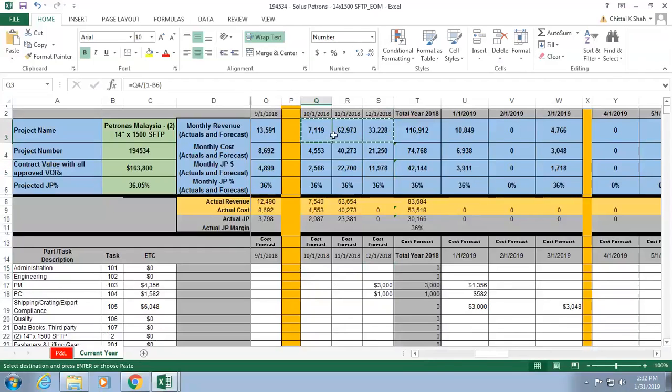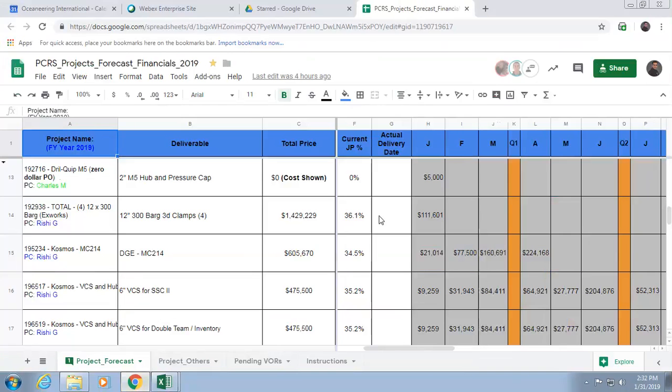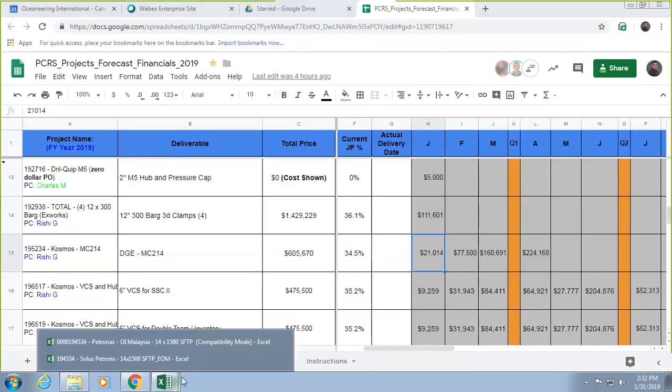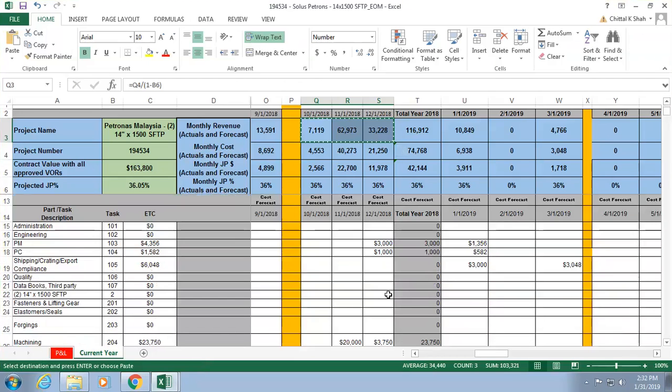They'll take these numbers and go to the summary file and paste those numbers based on the months. And you can literally take this whole series and just paste it based on when that month is starting. So now you have a summary of what that project is going to be doing every month. Not the detail lies over here. All the detail of what the breakdown is lies here. Just the summary gets copied over there.